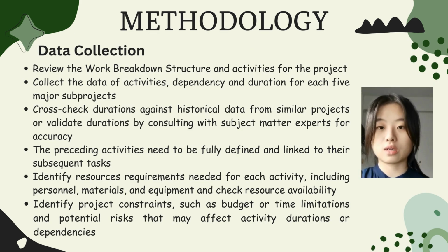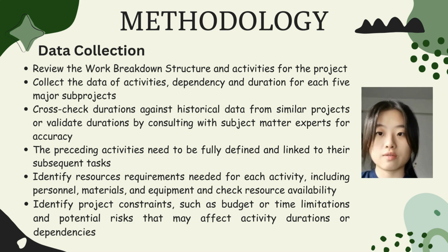Next, I will present the methodology part. So for the data collection part, we must first review the work breakdown structure and activities for the project. Then collect the data of activity, dependency, and duration for each of the 5 major sub-projects. Next, cross-check duration against historical data from similar projects or validate duration by consulting with subject matter experts for accuracy. The preceding activities need to be fully defined and linked to their subsequent tasks.